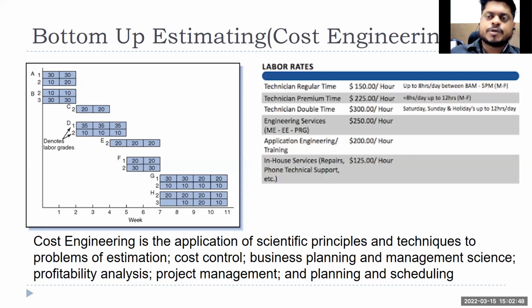Rather than doing that, I'll outsource 20% of the work. The regular workers will do 80% of the work in regular time, weekdays, 5 days a week, 8 or 9 hours, within the 22 or 23 working days in that month. The balance 20% I'll give to an outside party, right?